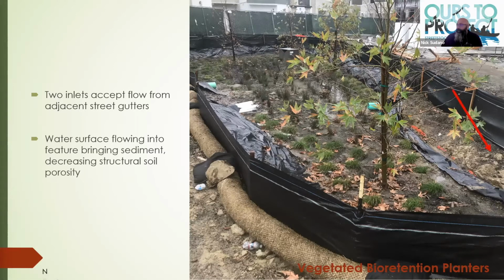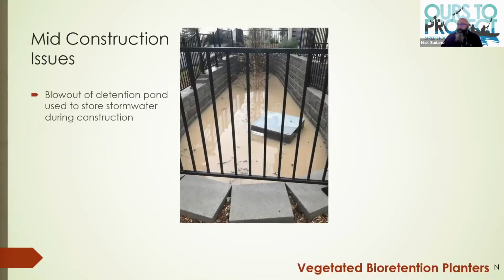Again, you just need to watch out for the water surface flowing. If you're going to have these features available, you really need to consider whether or not they should be accepting runoff from the construction site, or whether or not that feature needs to be temporarily plugged during the construction activities. Again, just things to look out for during construction or even after construction is how are these functioning during a rainstorm? We shouldn't see this.